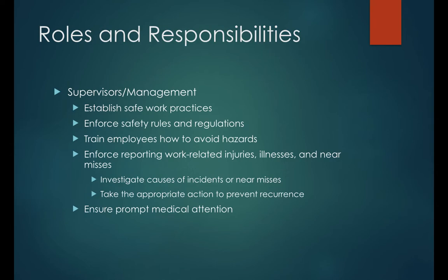If they see two or three instances of something getting in somebody's eye, they're going to want to make sure. Hey, does our program say we need to have safety eye protection gear on this project? If not, let's update that safety program. Let's update that safety plan, and let's redistribute it and supply this PPE, appropriate PPE.